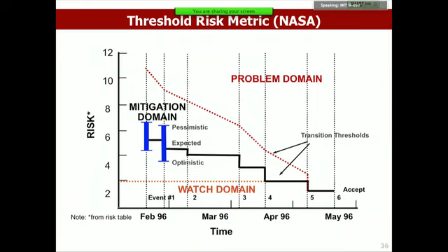There's a lot of things you can do to affect both the probability and the impact, right? Radiation, extra shielding. And so the idea is that over time, you're going to reduce these risks gradually below some threshold. So this red line here is like the acceptable threshold of risks at that point in the program.